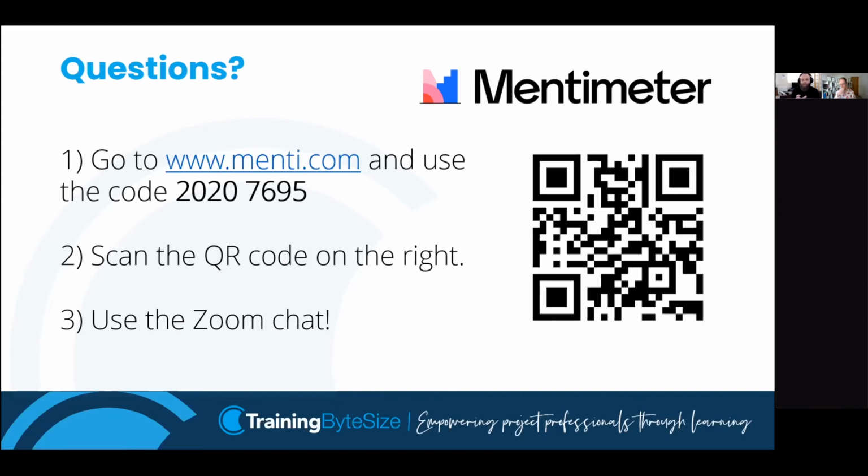If the hybrid life cycle is mostly iterative with a bit of linear, I would say EVM might be a bit tricky to use. If the hybrid is mostly linear with a bit of iterative, then the EVM strategy, or the tool, would work better. But I wouldn't use EVM in an agile IT-based project. It just wouldn't work in the right way.